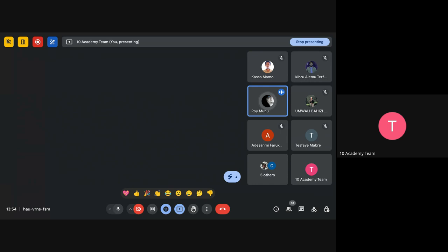But let me finalize the scenario that I was creating, and I hope that you will get the idea. Let's assume that we are developing a task management tool. In sprint one, which we assume is 2 weeks long, the focus will be on creating basic features such as task creation, user authentication, and categorization. Those three basic features should be done within the 2 weeks. So this timeline is called a sprint for us in the project.